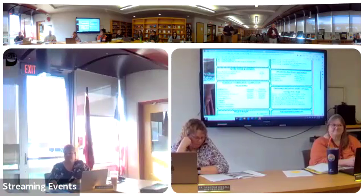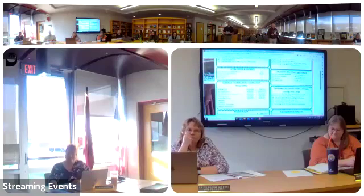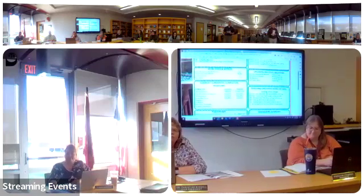Right, and that's part of the critical path. I'd say that's critical, pretty good. That directly affects the end date turnover, so yes, pulling back time on that will help pull back the turnover.